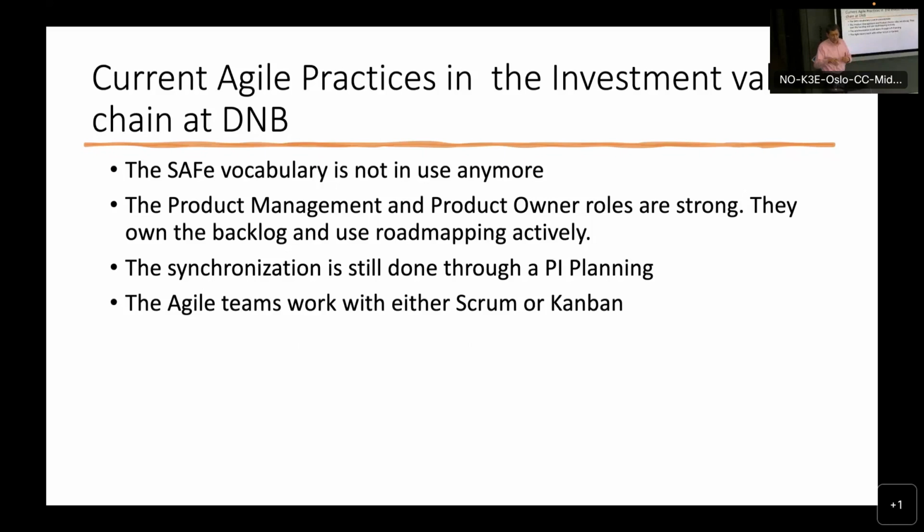If we take 2023 today, when I wrote it, I went back to my ex-colleagues and asked, what is left? They don't use any SAFE word, but they still synchronize 200 people through a PI planning. They still have road mapping to tell what will come in the next 6 months to 1 year. So a lot of things I introduced and coached the business on are still there.